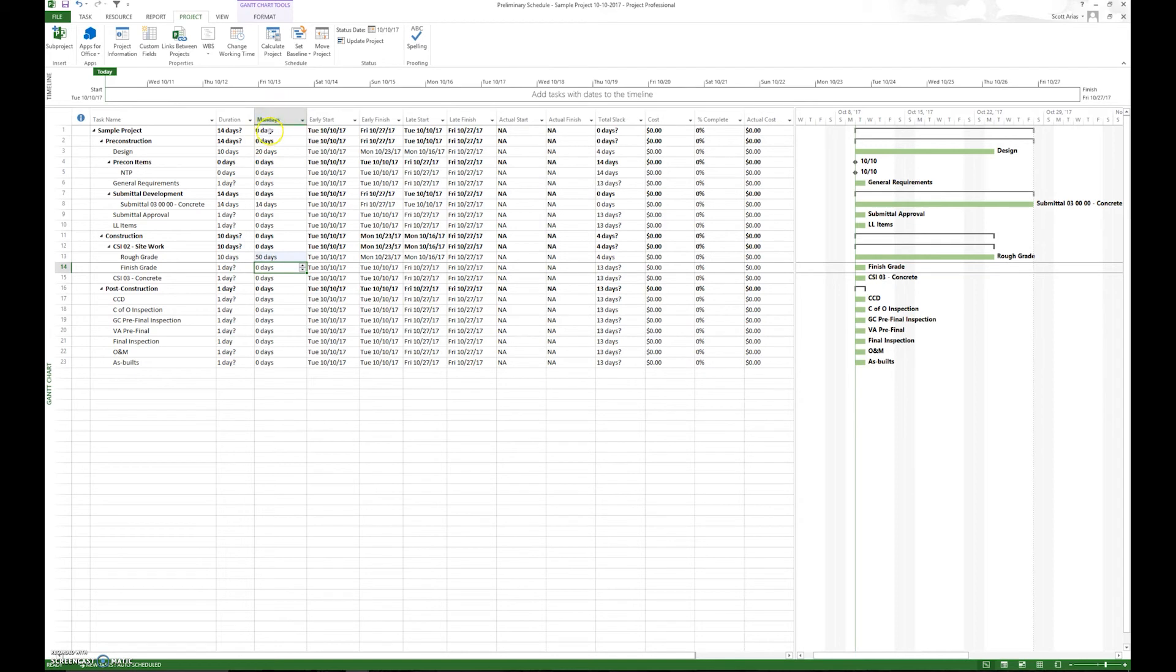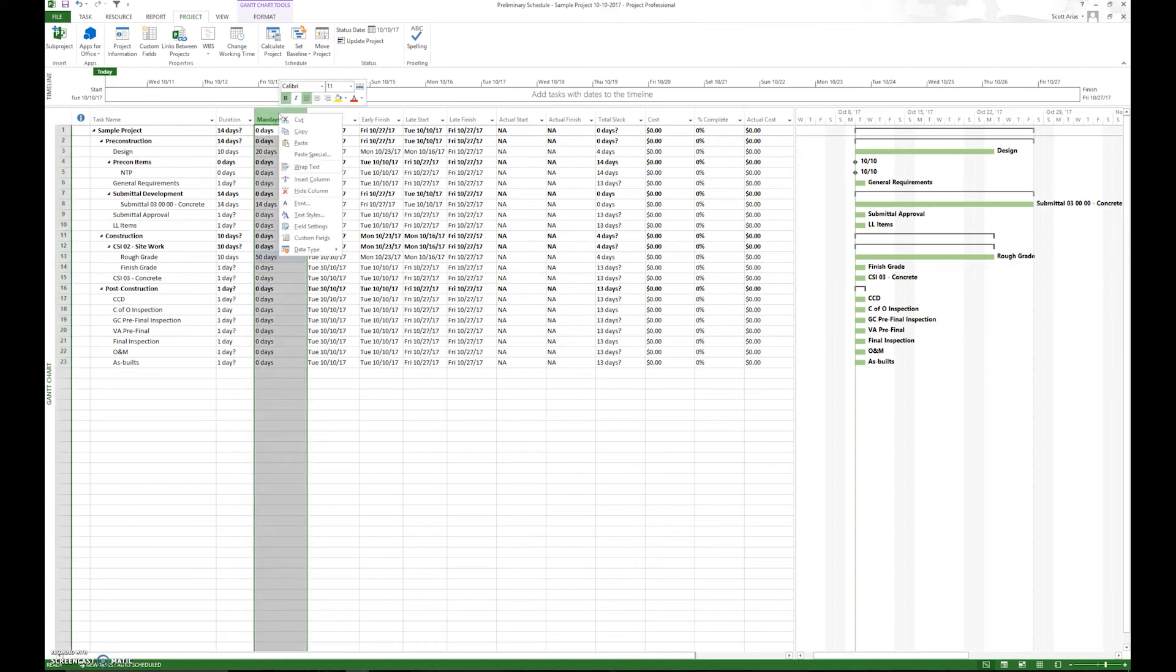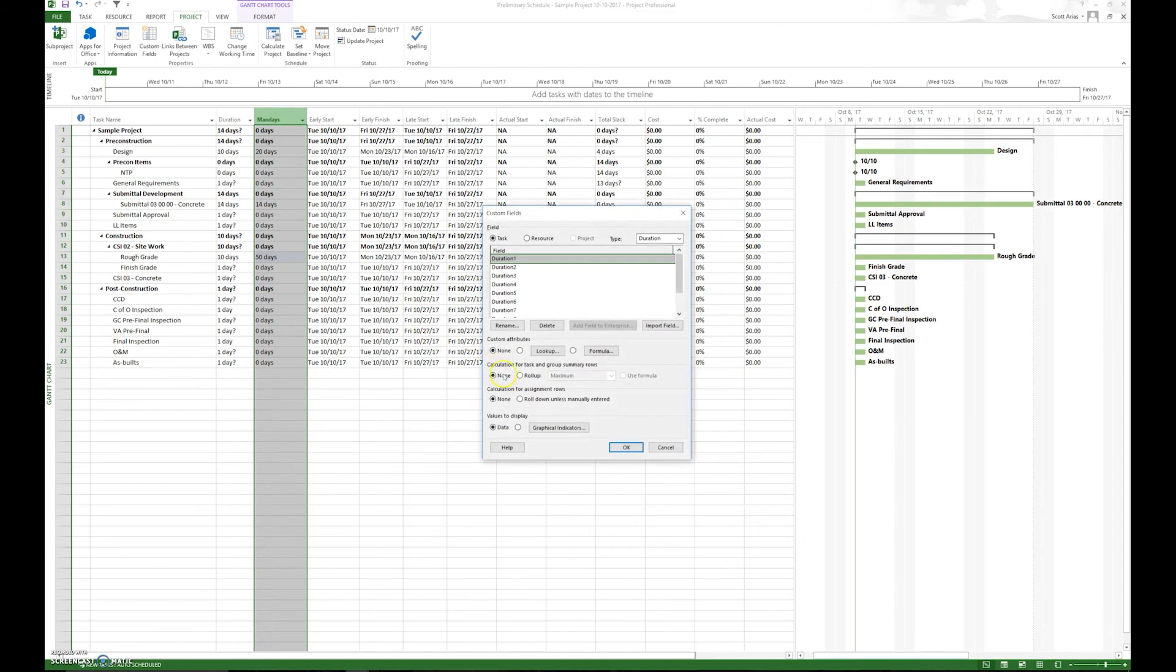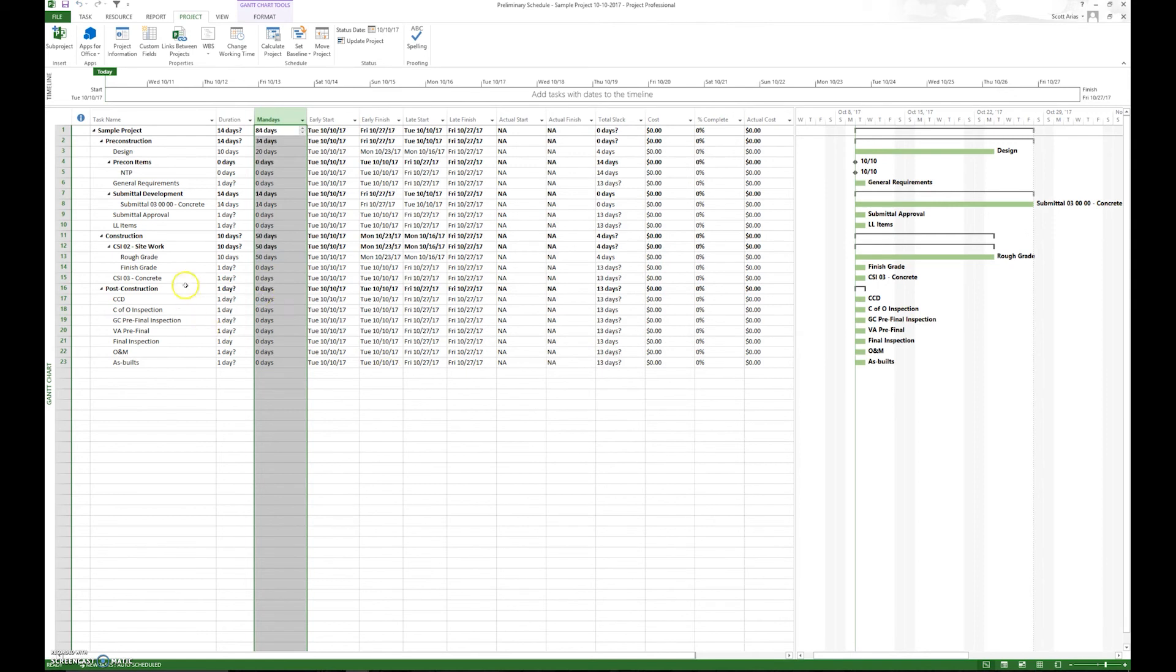What I will say is you can see here that we have all the information we're putting in here, but it's not rolling that information up. So what I do is go ahead and right click on the column, go customize field. And I want to roll up the calculations and I want to make it sum. And what that'll do, roll up and sum, it'll roll all that information up and add it together. So important to be able to do that.